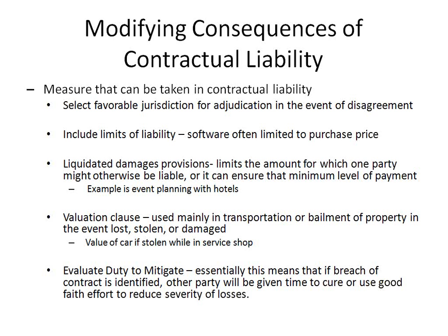Well, liquidated damages basically says you're going to pay me the difference either way. So I'm going to be made whole, because that was the expectation. You didn't meet your obligation to get enough attendees. Because I could have sold that space to someone else, those are the damages I suffered. So therefore, this is what you're going to pay.